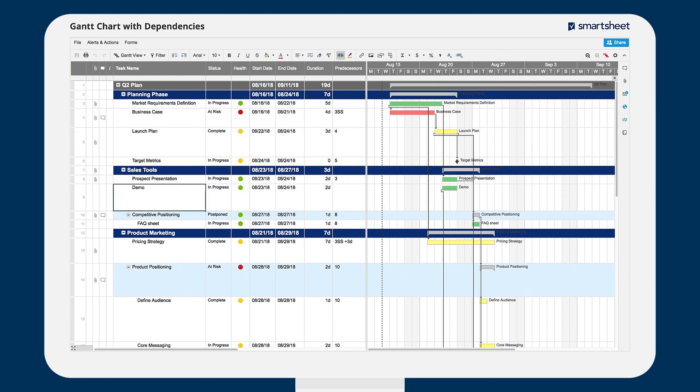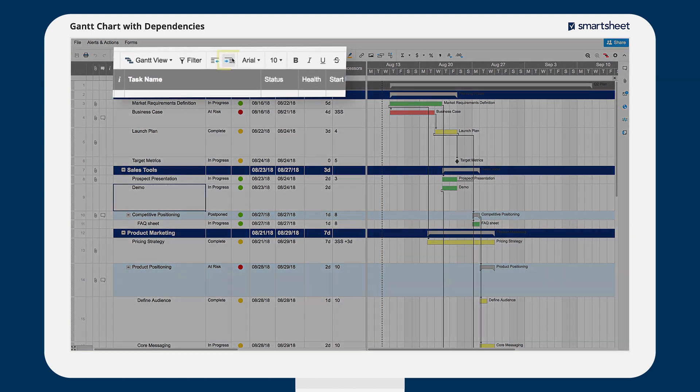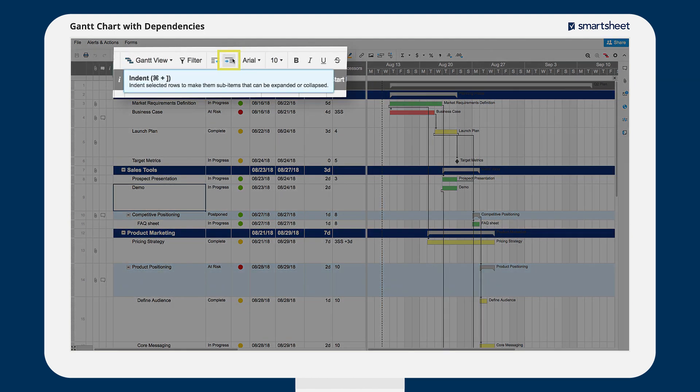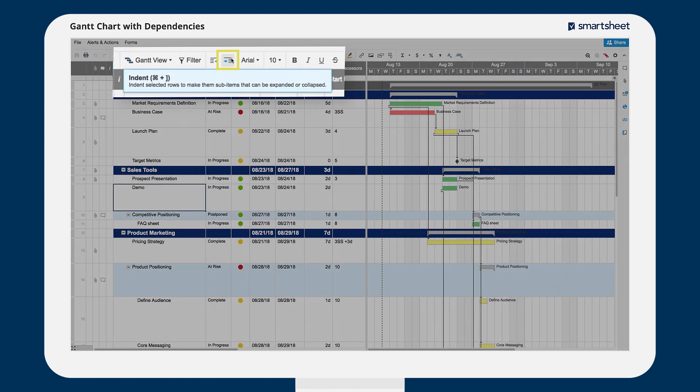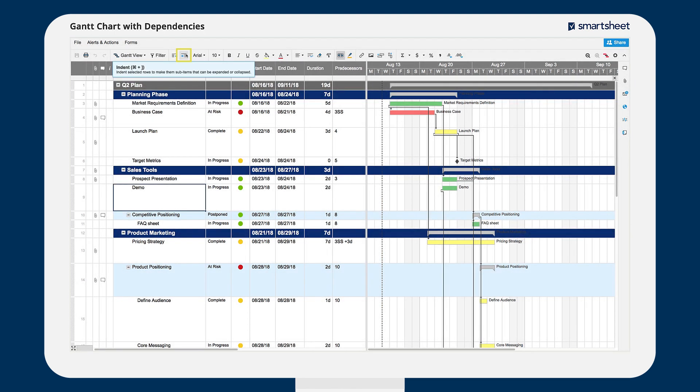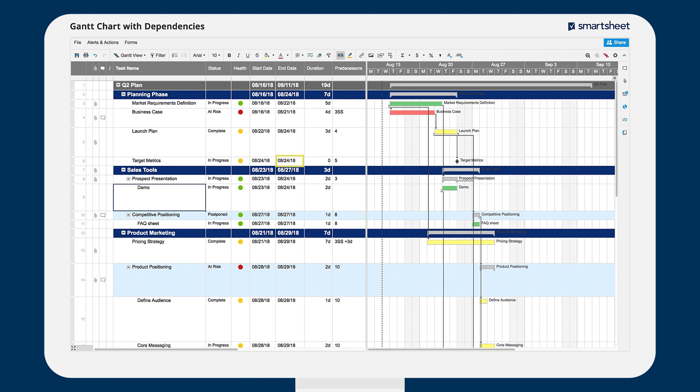Subtasks help you structure projects and summarize progress. To create a subtask, click on the indent button on the toolbar. Smartsheet automatically uses the start date and end dates of your subtasks to calculate the start and end date of your parent row.